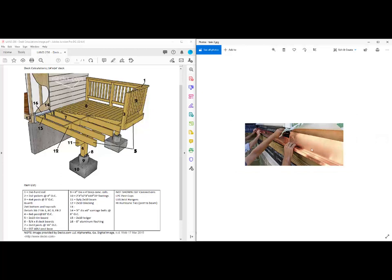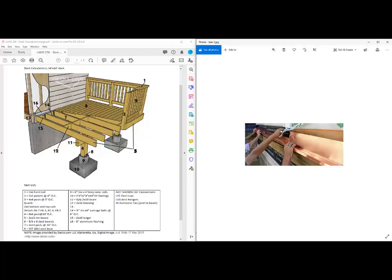This is an example of the flashing being installed - a copper flashing put over top of the ledger strip, so the ledger strip has to be installed. In this particular case, we're going to expose the siding, install the flashing, and then put in the ledger strip. We're using a slightly different technique. The order of operation is critical in how many people work on the project at that time. You can see they've got a secondary piece of flashing to make sure any water that runs down the doorway will leach onto the flashing and onto the deck surface.